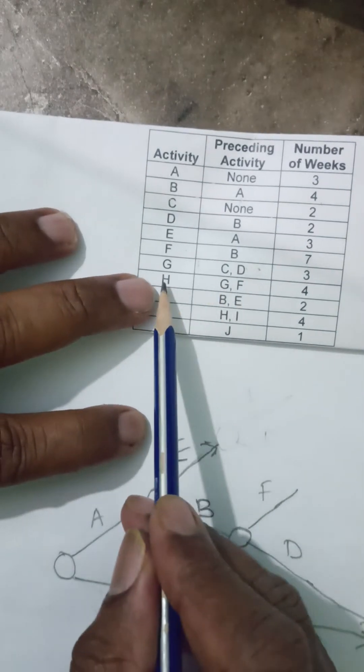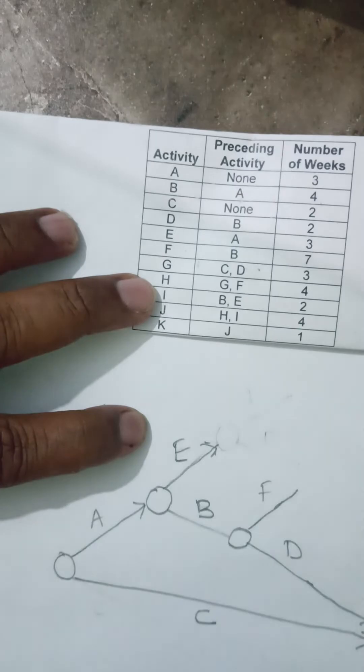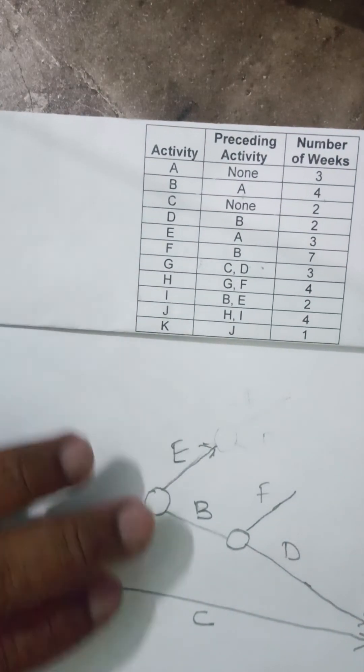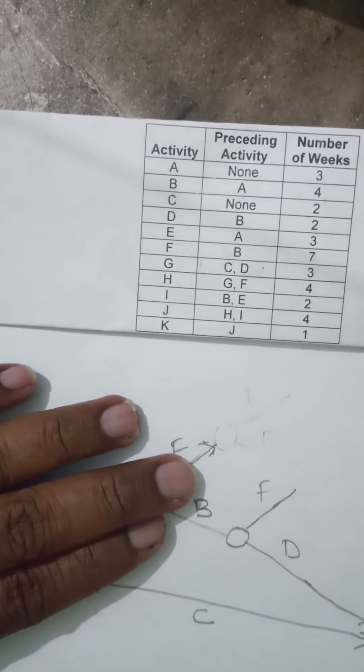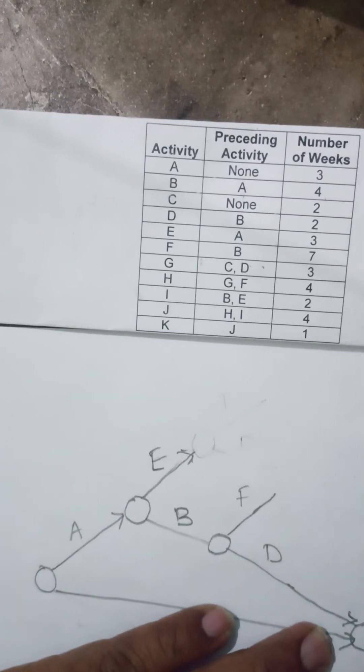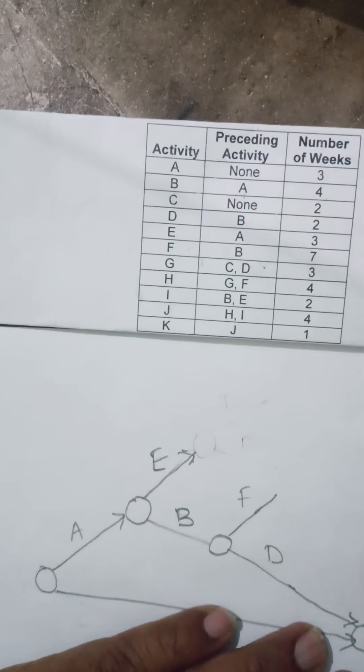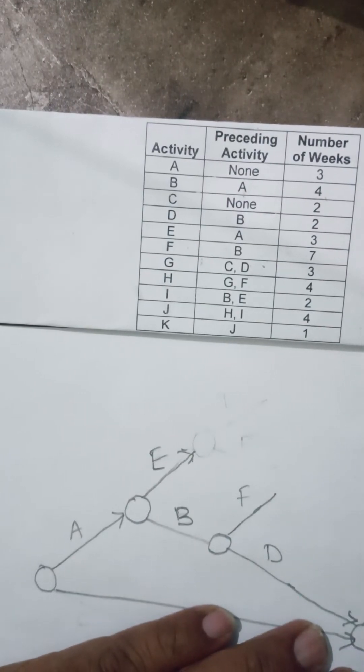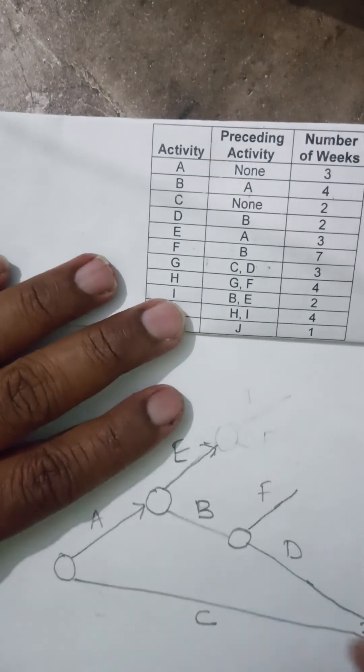H is starting from G and F. My G is here, F is here. And from there H is starting. Let me take my G a little bit up, somewhere here. And from there this F I can connect.